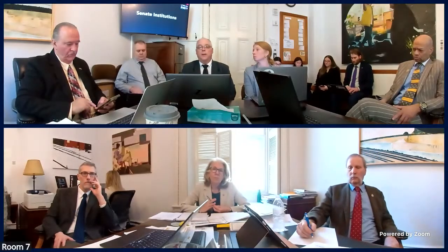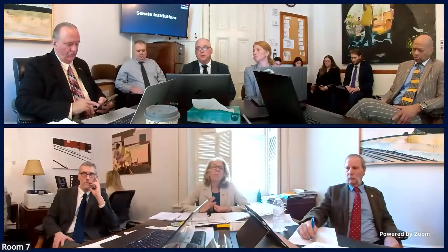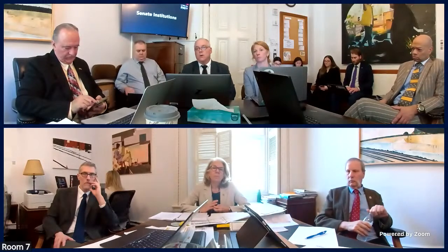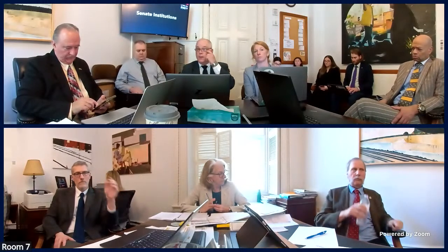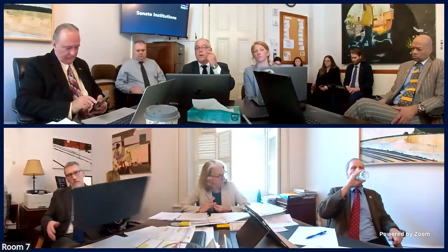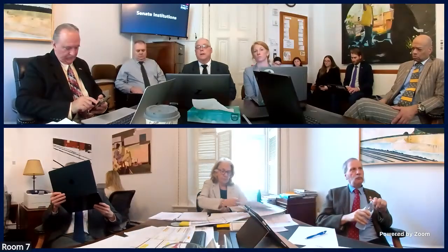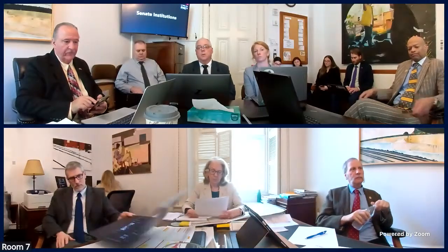Right now, we have a construction manager actually bidding this work out. In the next couple of weeks, we'll have an actual dollar amount. What will happen if we don't get the additional funding? I will then have to work with that construction manager on what to cut and what to delay. Both of those will come at an expense later on to try and add them back into the package.